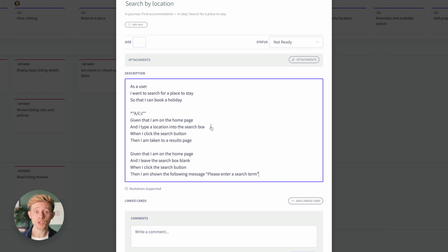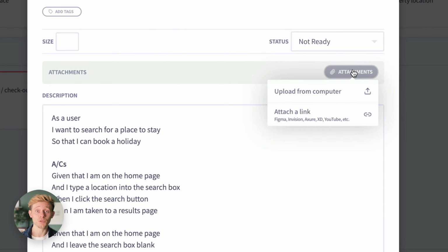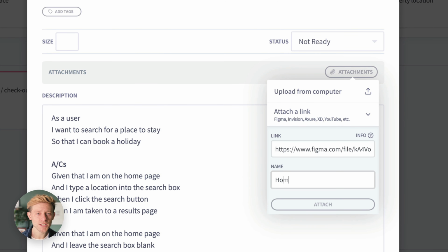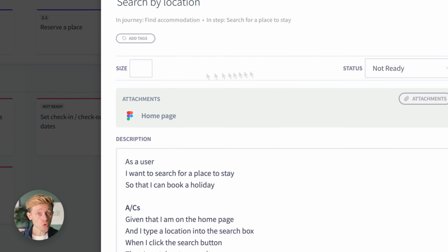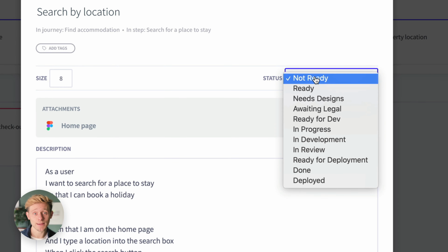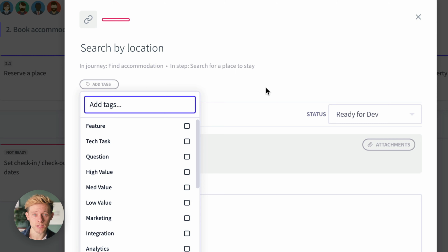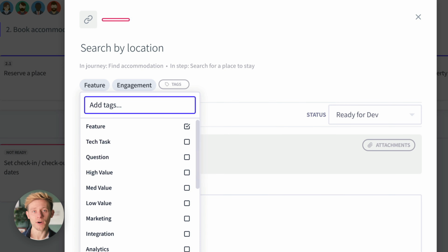Once you've created your release with high-level stories, you can start ensuring that these stories meet your definition of ready. This is the time where you can start filling out story descriptions, adding acceptance criteria and sizing stories, ready for them to be picked up by the development team.